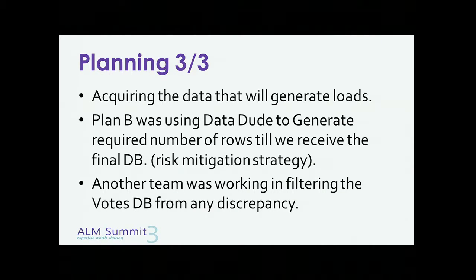So we didn't want to rush them, and we tried to mitigate this risk by preparing what is called a Plan B database using SQL Server Data Tools. Using SQL Server Data Tools, we succeeded in generating something like fake data for 55 million voters using the same regular expression that is used in the national IDs of Egyptian people. So in that way, we had two databases, the original one and the Plan B fake database, just as a risk mitigation tool.